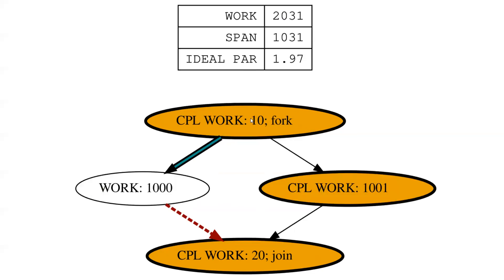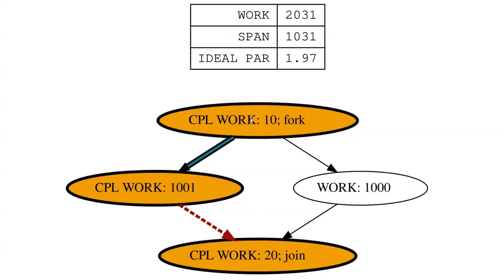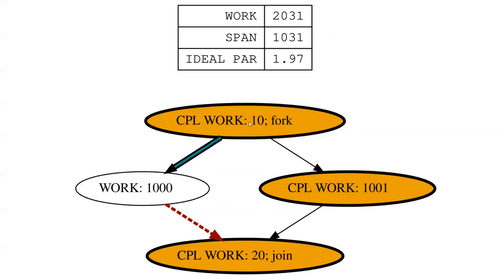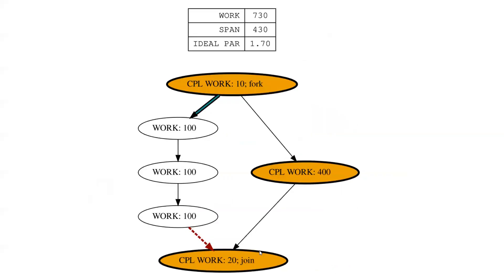Obviously, it doesn't matter if it's the spawn edge or the continuation edge. It's going to come out with the same values. It's just the longest path through no matter what.